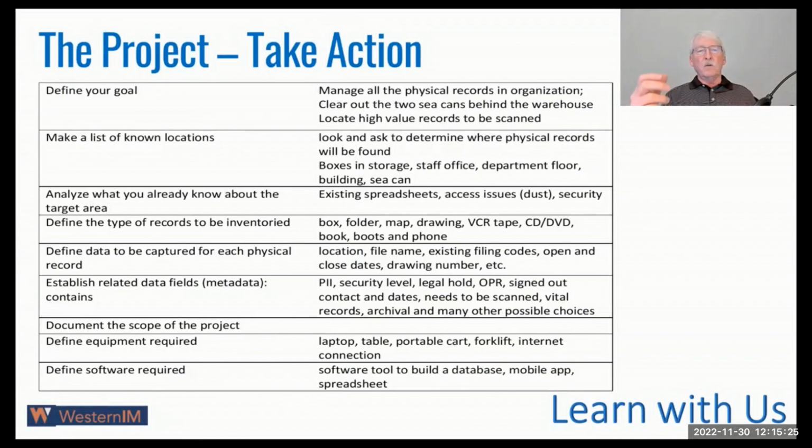List the locations. It's amazing how many times you think you know all the locations where there might be records in the organization, but sometimes that's not exactly true. So this is asking questions, looking around, talking to divisions and areas in the organization where records might be, and trying to get a true list of those locations.